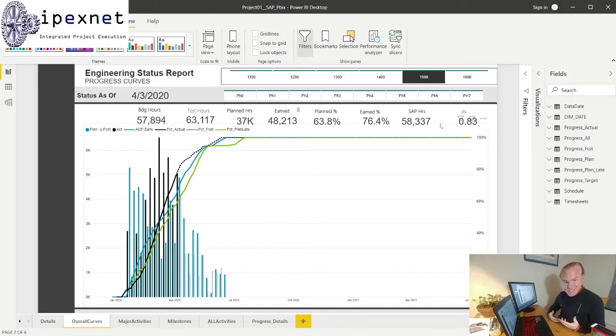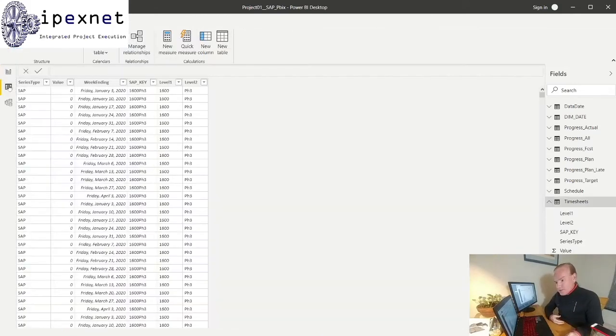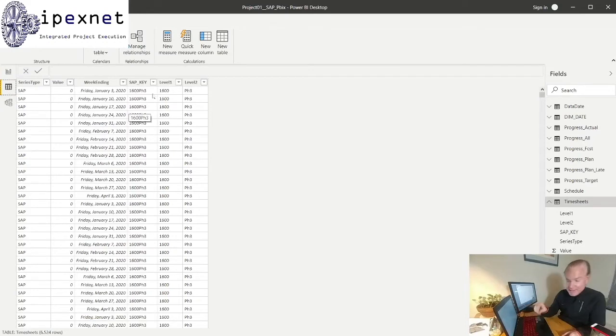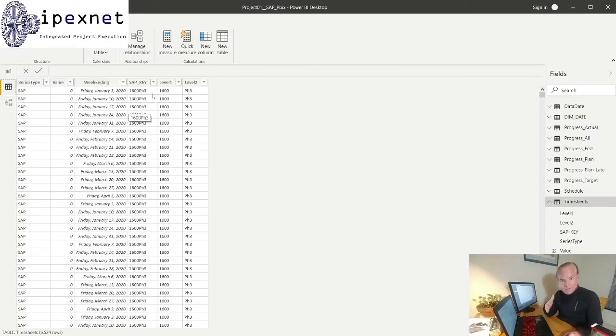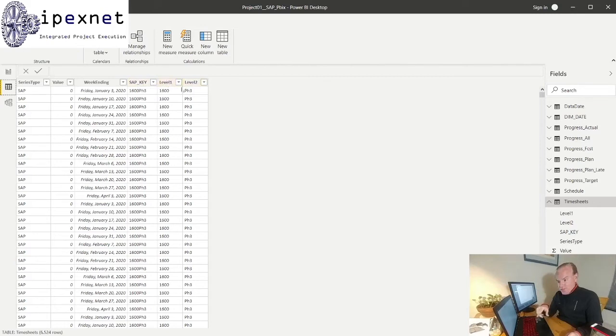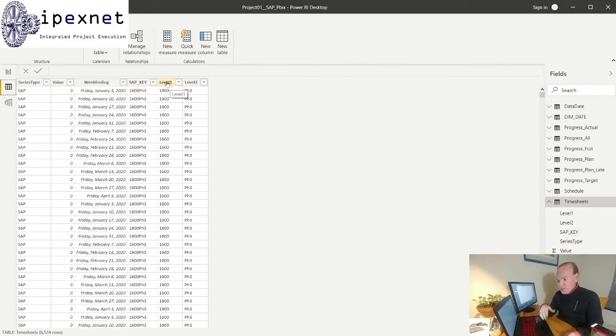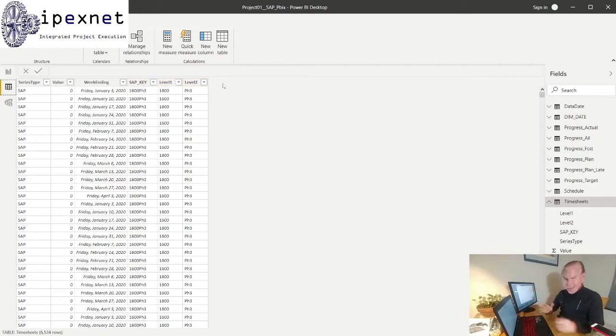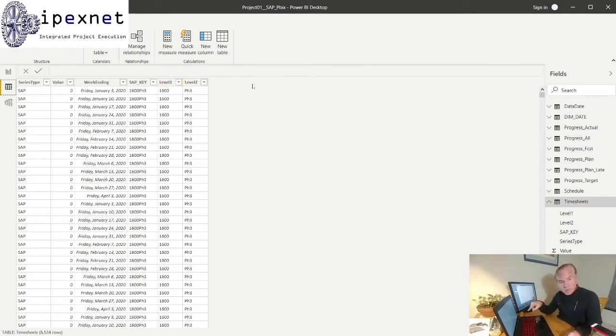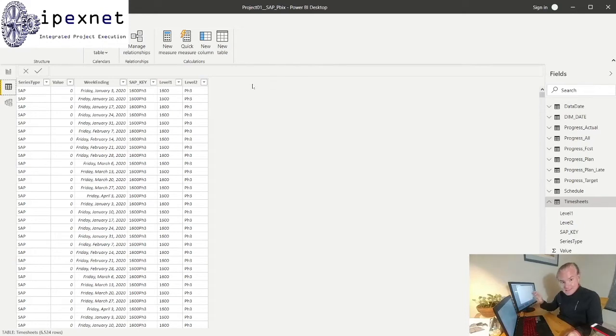So let's go look at my timesheets. I've already got it open. In my timesheet system - well this is just some dummy data - but in your timesheet system you'll have some references. Here we just have a level one, level two, and the key, the unique key that I want to track on, is just to merge the two together. If you have a level one, level two, level three, level four, and whatever data you put into these fields, you can merge them all together. But you need to make sure: are you tracking your progress in the same way? Are your schedule IDs keyed to that same level of detail as well?